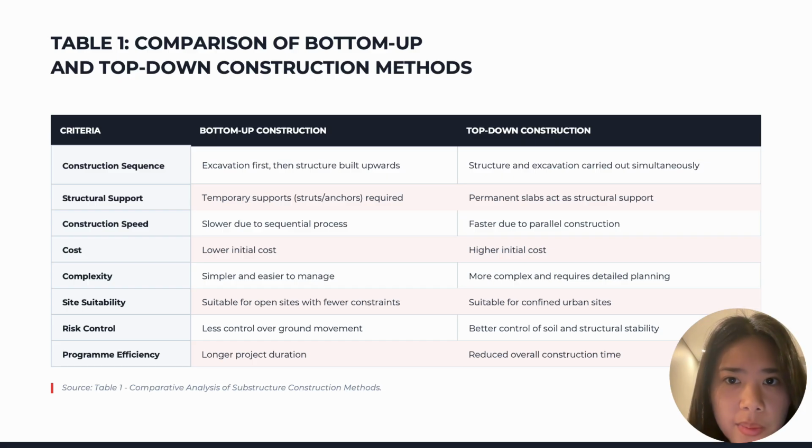This table summarizes the key differences. The bottom-up is simpler and cheaper but slower. The top-down is faster and more stable but more complex and expensive. Therefore, the choice depends mainly on site conditions and the project constraints.